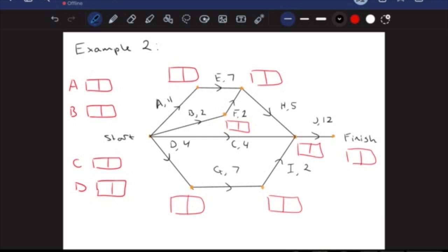Now, once again, we're beginning over here, and you can see this first vertex, my starting vertex, has 4 activities coming out from it. Activity A, B, C, and D. So, remember, these are the first activities. They have no predecessor. So, their earliest start time is always going to be 0. Now, we are going to forward scan first to fill in all these boxes on the left.